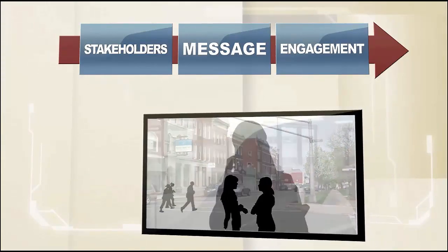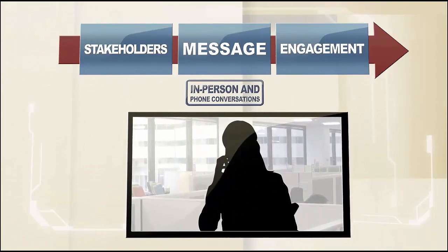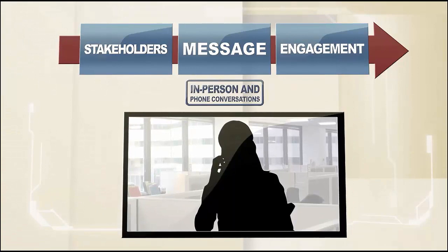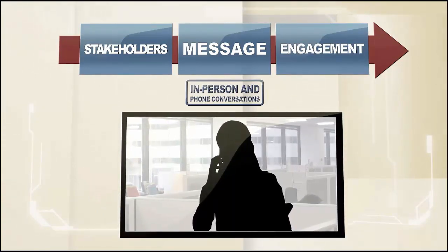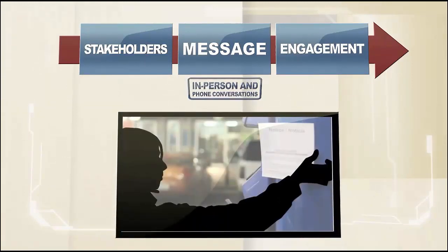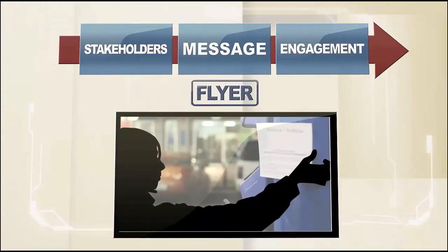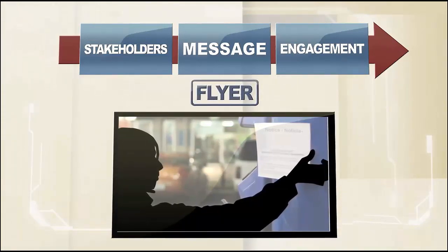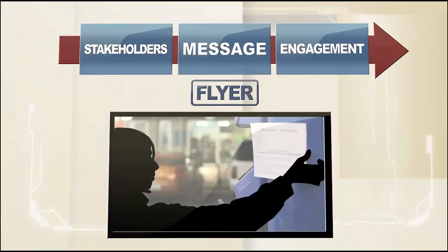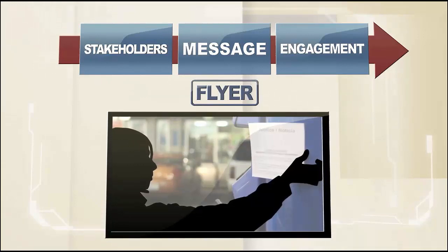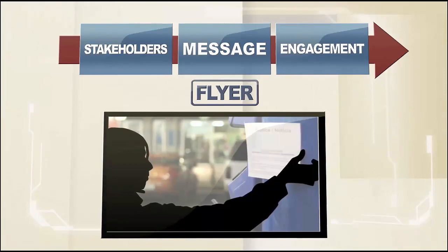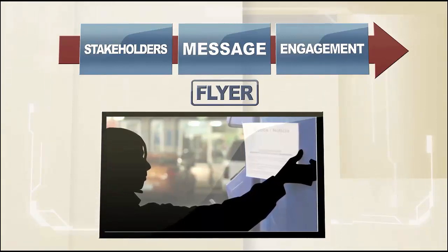The next day, the project manager calls the city's Chamber of Commerce and its Hispanic Chamber of Commerce. The Hispanic Chamber informs her that the current timeline of construction will conflict with the Cinco de Mayo Day parade. To determine if anyone else might be impacted by the project, the team creates a bilingual flyer of relevant information, complete with a project phone number. The flyers are posted in the windows of the businesses and planned to be distributed at the parade. A resulting call from a member of the community notifies the team of an arts and crafts show scheduled for a week after the parade.